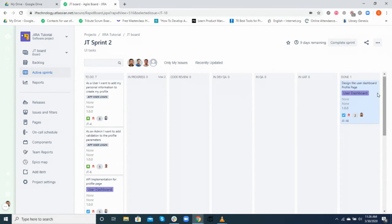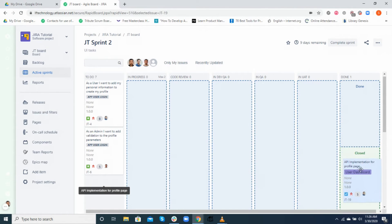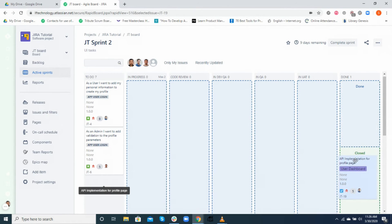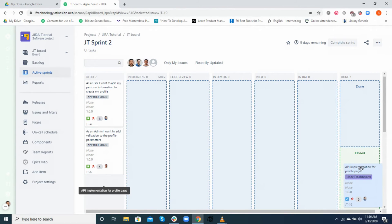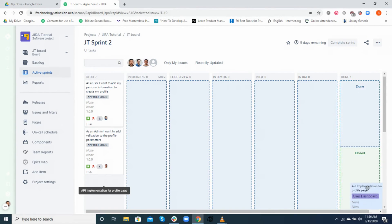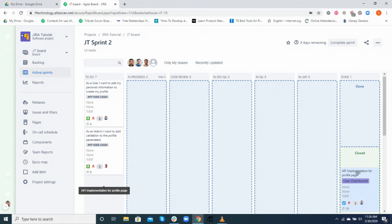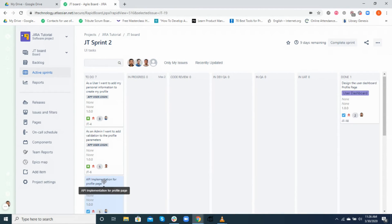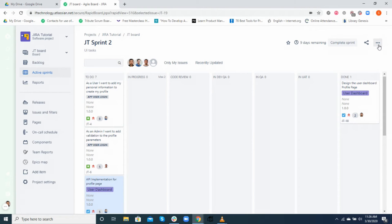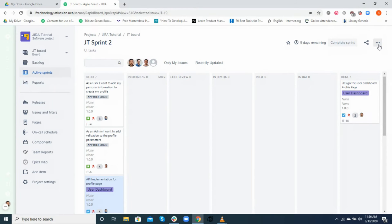For instance, the done section can be divided in two parts: status done and status closed. Let's assume we had a resource task in our sprint. The resource was completed, however the code was not merged to the master branch because it had dependencies on other items. Should we now mark this as done? Well, definitely the ticket was done indeed, but since it was not merged to the master branch, the task did not make it to our production server at this point in time. In such cases, we could make use of the closed status. This could give our customers a sense of which items did really make it up to the production release and which did not.